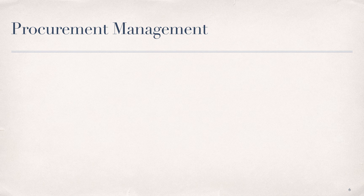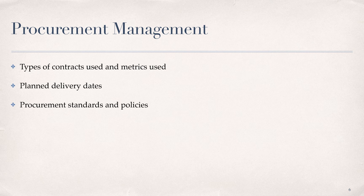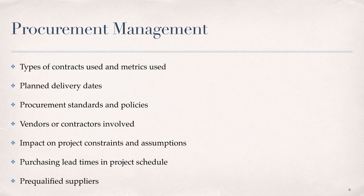The process of obtaining goods and services from providers outside of the organization is called procurement. The procurement management plan details how the procurement processes will be managed, and it includes types of contracts used, metrics to measure contractors' performance, planned delivery dates, the organization's procurement standards and policies, the number of vendors or contractors involved, how purchasing may impact constraints and assumptions of the project plan, coordination of purchasing lead times with the project schedule, and the identification of pre-qualified suppliers. Be sure to complete both reading assignments for this module for additional information on cost and procurement management.